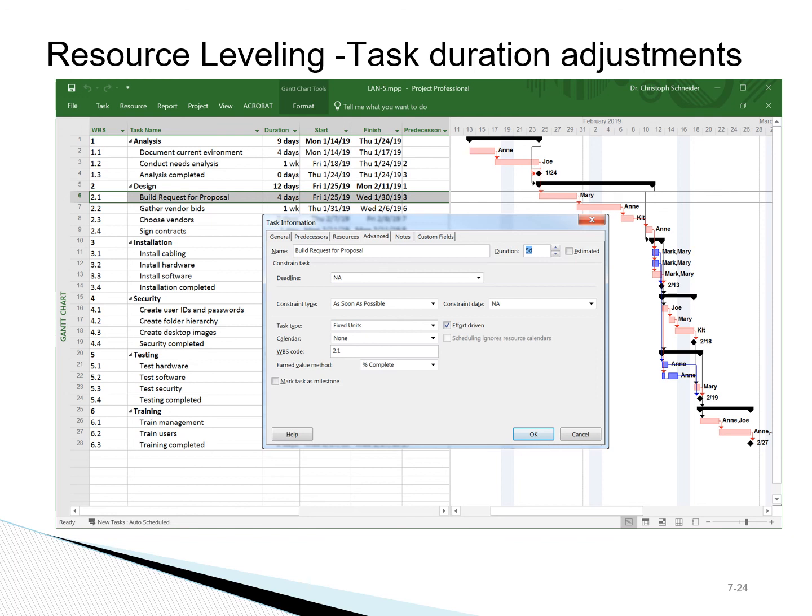Sometimes the demand for a resource exceeds the availability of that resource. For example, if we have only one nurse to participate in a project, but the tasks for that project require 2 nurses, we will need to stretch the duration of the tasks requiring the nurse so that our need for the nurse does not exceed 1 nurse at any point in our schedule.